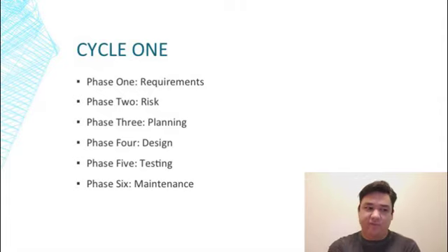With the fourth and fifth phase, I have it set up with an option where if for some reason you have to bail out as quick as you can, like you have to end it, whether you're running out of funding or circumstances change and you have to get the product out immediately, the fourth phase allows you to bail out, and if you want, go to either the next cycle after it's been designed and then released, or you can just bail out and end the project in general. That way it doesn't go on forever and ever.